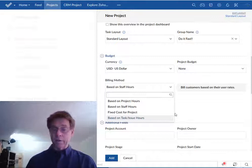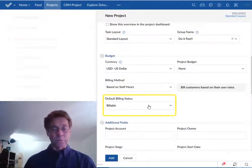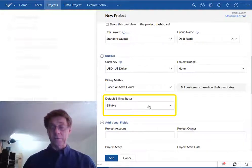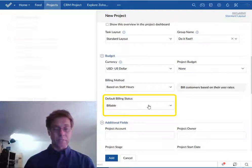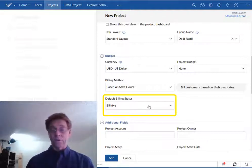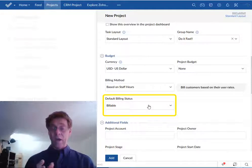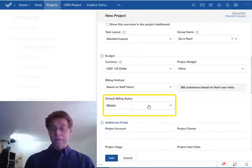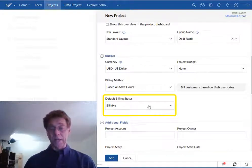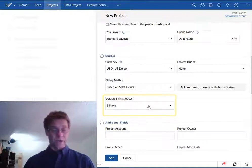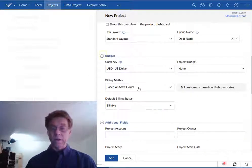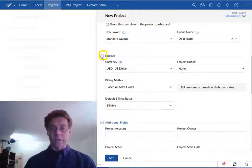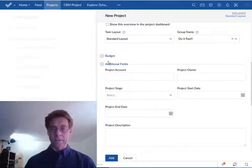Finally the default billing status, my suggestion to you is to leave this as billable otherwise you have to explicitly tell Zoho projects every hour that is billable. This just sets the default to billable and you can make exceptions after the fact. I'm going to roll up that section by clicking on the carrot, the upward facing carrot.